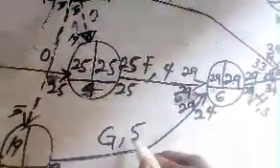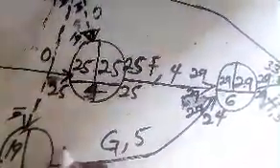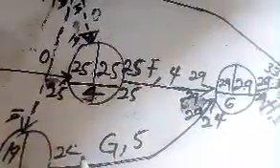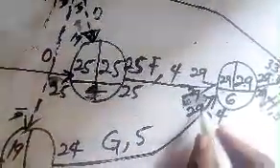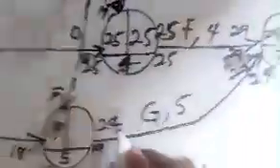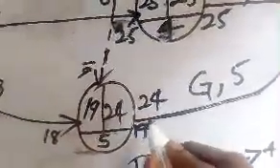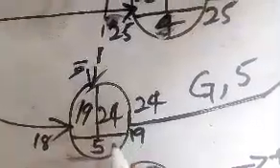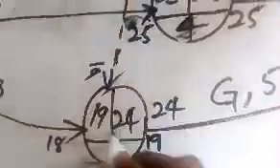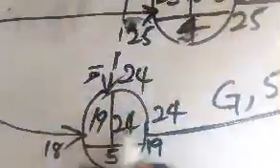So my 29 minus 5, I have it as my 24. So my 24 will be the one entering here too. Why? Because it's the only activity entering the node, which is the event. So I have my 24. So 24 will come out here.